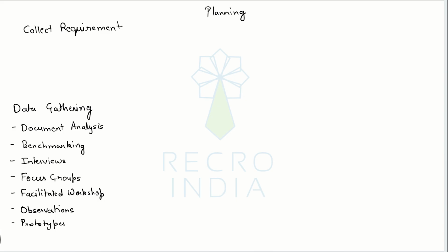And if they have some feedback, some recommendations, or want something done differently, now would be the time to provide that input, because once you start the construction in full swing, going back and changing something can be very costly and time taking. So in that case, prototypes can be a good way to further refine your requirements.